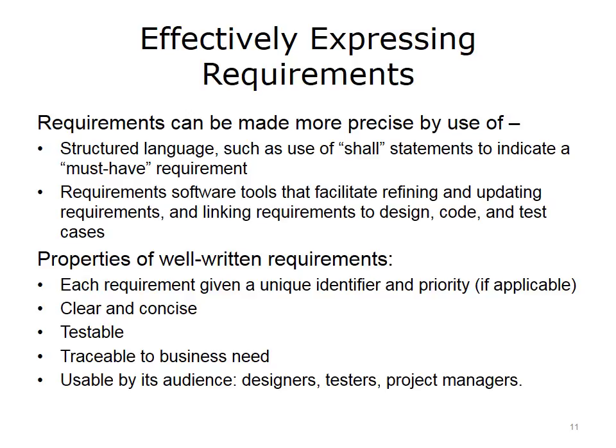Make sure your requirements have unique identifiers, so it's easy to refer to them. It's also often reasonable to establish priorities for requirements to make clear which are the most important requirements. We talked about using the word shall to identify must-have requirements. In cases where there might be shortfalls in resources, you'll need to know which are the most important requirements to make sure they're implemented.